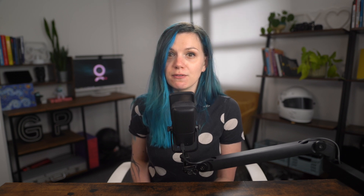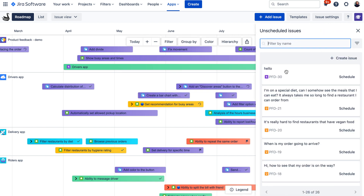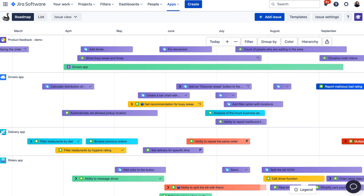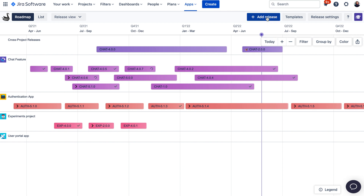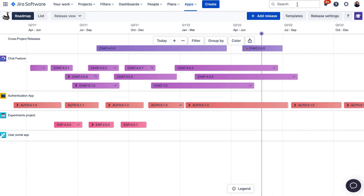Before I go into the details of Swanly and how it can help you, let's have a look at Swanly's main views. Swanly comes with two main views: issue and release view. The difference between these two views is what kind of activities you can schedule on your timeline and create reports for. In the issue view, you can manage and schedule issues from your Jira — be it epics, stories, tasks, subtasks, or any custom issue types that you have. And in the release view, you are scheduling releases, also known as fixed versions, on the roadmap and generating reports for these.